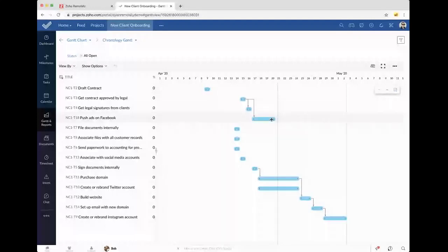And it just gives me a really clear idea of what the date I'm going to finish this is actually going to look like. And that can be hard to do when it comes to these really big projects, because we always think we can make up lost time in the cracks. And sometimes you can, but it's just better to have a realistic view up front and say, all right, this got delayed by this much, so the whole project is going to be delayed by this much.